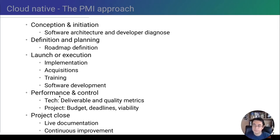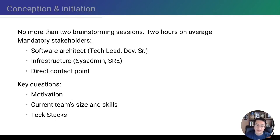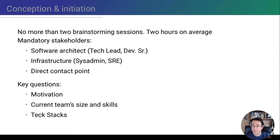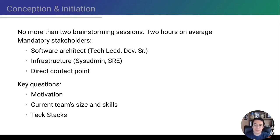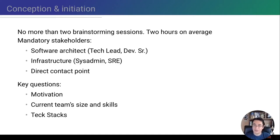In the beginning, you have to involve important stakeholders in order to define a proper roadmap. If you are a consultant like myself, you have to create this roadmap to give a map of investments. When you bootstrap this kind of migration project, I recommend creating brainstorming sessions — no more than two — but you have to be sure that the important stakeholders will be participating. I take these bootstrapping meetings across two sessions, not more than two hours each on average.